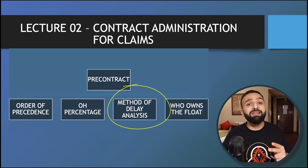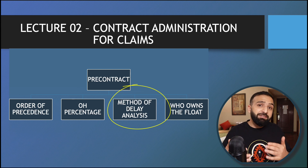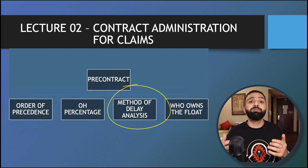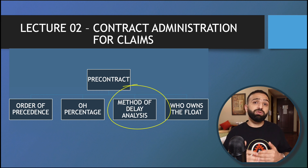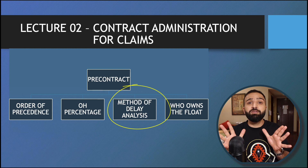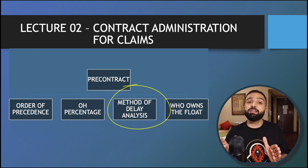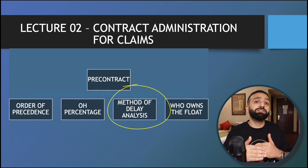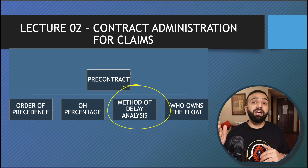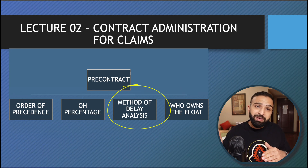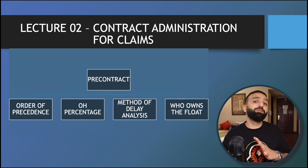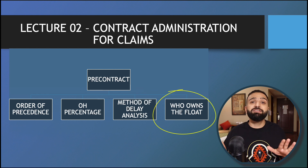The next thing we need to ensure is that the method of delay analysis is clearly defined. You may have faced situations where you did an impacted-as-planned analysis when preparing your claim, but then the engineer asks you to do a time impact analysis and you say that's not possible. If the method of delay analysis is clearly defined in the contract, this resolves unnecessary conflict. When you know which type of delay analysis method to implement, you will make sure you document your records accordingly during the life cycle of the project.